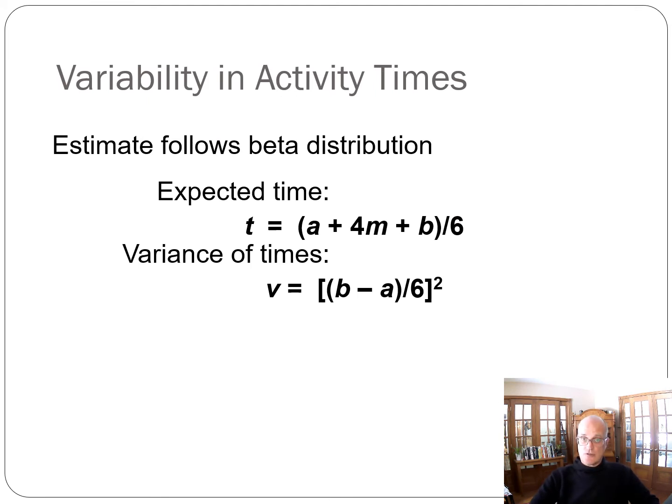When there's variability, the estimate follows a beta distribution. I'm not going to ask you about the beta distribution or show that to you in detail. But what it does allow us to do is come up with an expected time for a task. The expected time looks very much like a weighted average. The expected time is equal to A, which is the optimistic time, plus 4 times M, which is the most likely time, plus B, which is the pessimistic time, divided by 6. The 6 is simply reflecting the fact that you have 1 plus 4 is 5, plus 1 is 6. You are weighting the most likely time heavier than the other ones, and that gives you an expected time.